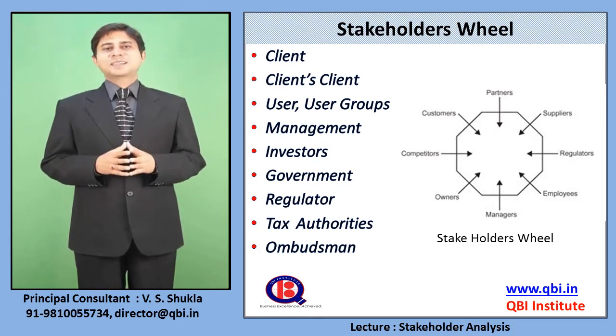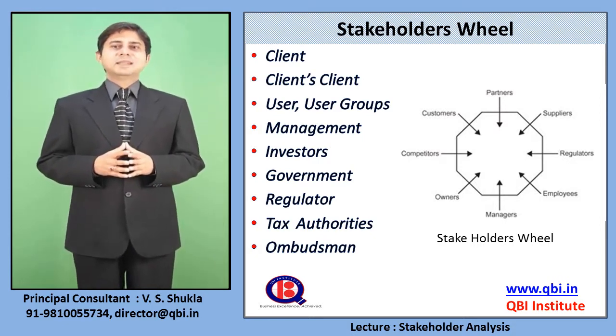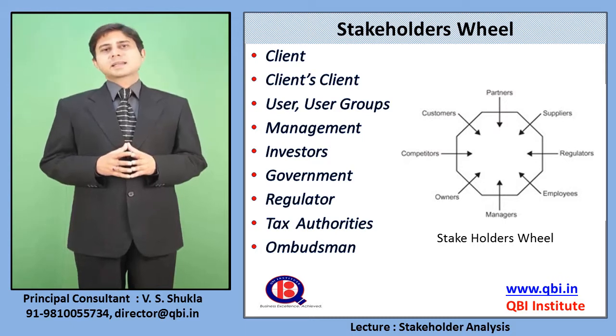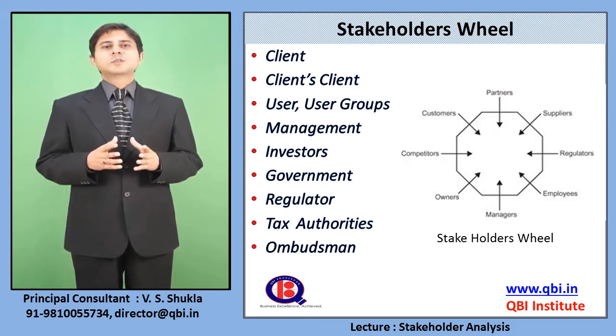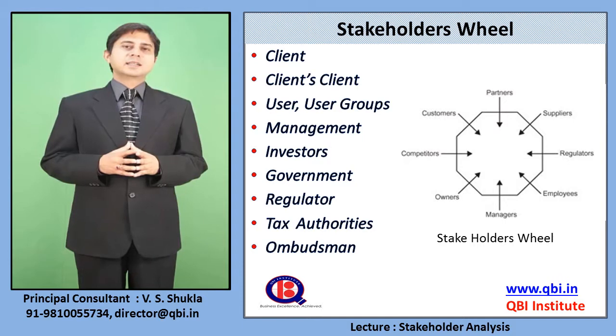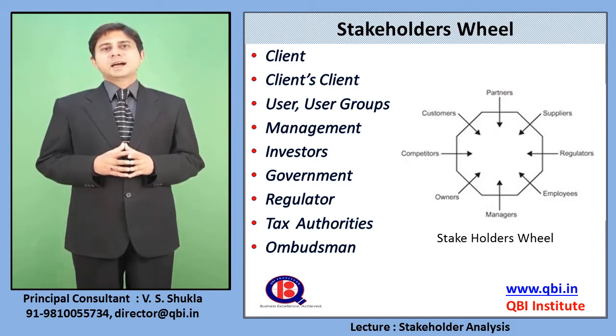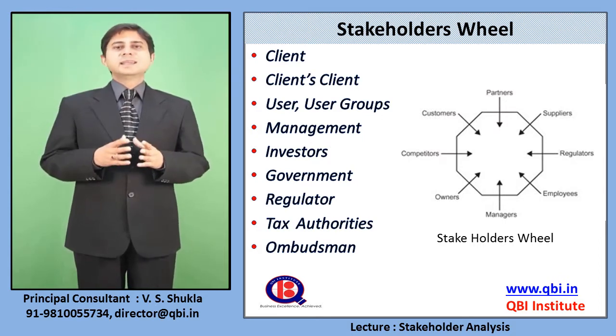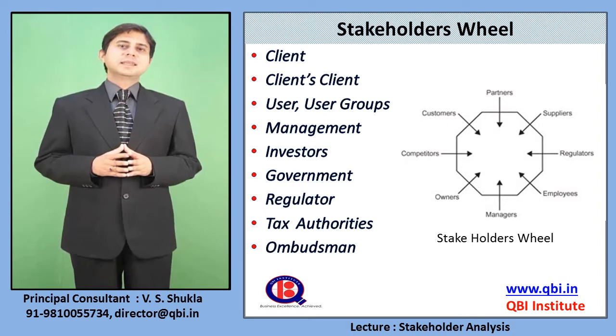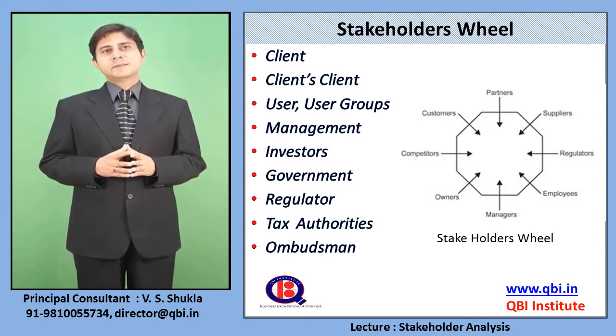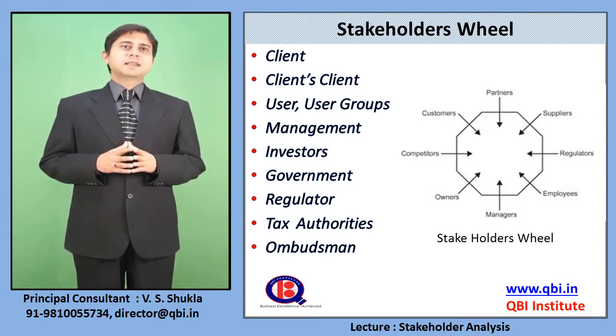This is an important observation. Many a times you see your client's client is the one who is going to use the application. So let us say if you are making an internet-based solution for a banking system, it is the client's client, or the account holder, who will use the system. So he is also a stakeholder. So you must keep him in mind as well.